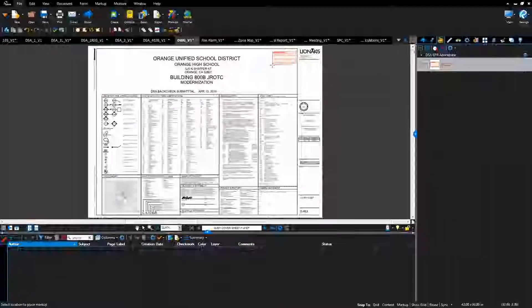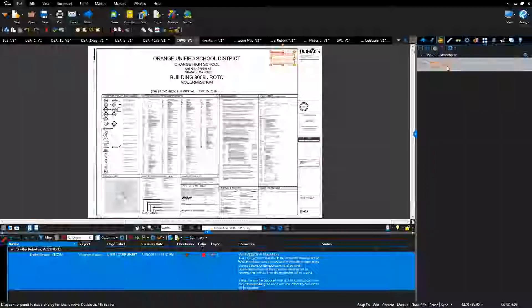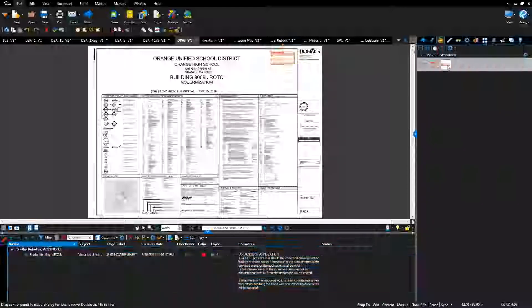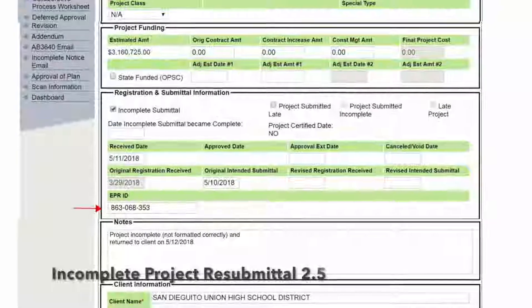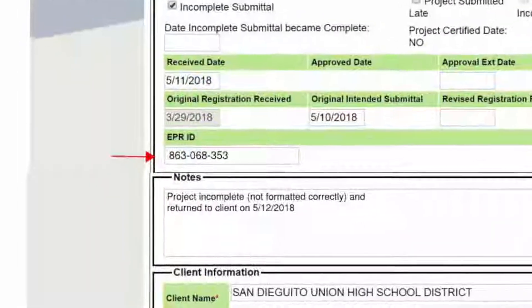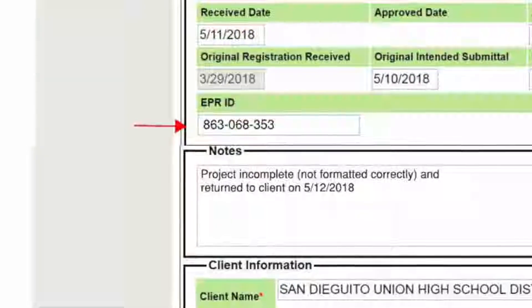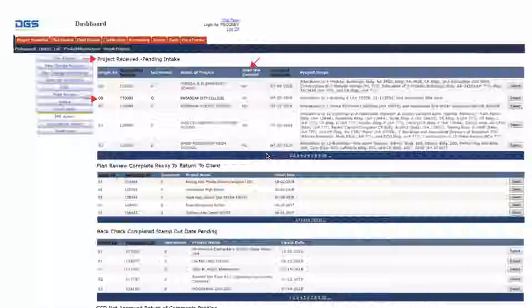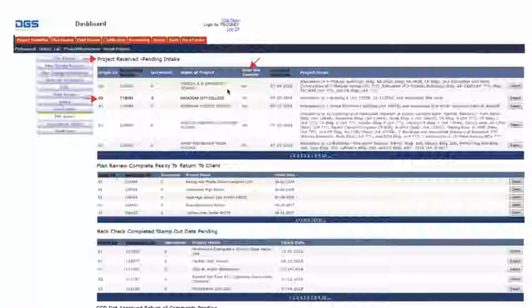Check the eTracker application screen for an EPR ID. If there is an EPR ID for this project, then the project is a resubmittal and the Bluebeam Studio project has already been created. Open Bluebeam Studio software and go to the EPR administrator eTracker dashboard, project received pending intake bin. Sort by over the counter, then highlight the origin ID, the application number, the increment number, and the project name.